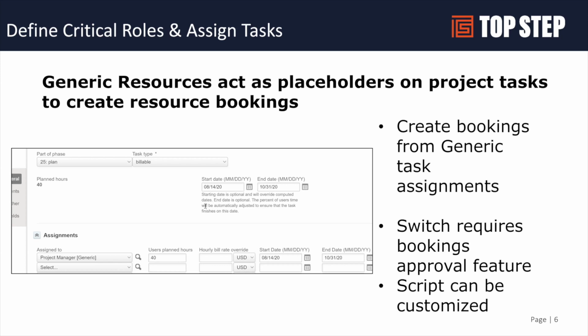And so what we've done recently is we've been creating some customizations inside of OpenAir where we create a checkbox or some sort of a field on the project when the project manager is ready to request resources. Then we have a scheduled event script that runs through, generates all these project task assignments, and auto-creates those as requested bookings in the resource module.